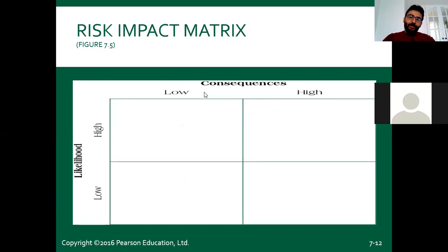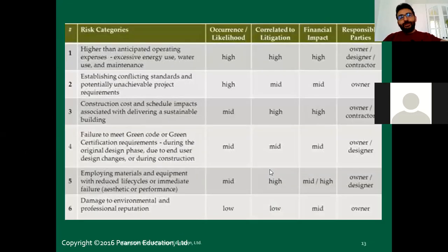So risk impact matrix is something that we mentioned more and more. Let me do it again. Likelihood of that risk and the consequences of that risk, okay? If the likelihood is high and the consequences are high, it's a problematic risk, okay, here. If the likelihood is low and the consequences are low, you don't care about that risk. You don't need to do anything. But there are some risks in between. So as you see here, you can categorize some risks like